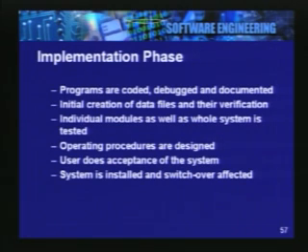Then we carry out the user acceptance, where the user will do a functional walkthrough for the system that we are ready to deliver to him. So functionally it should be acceptable to the user. Moreover, it should also be acceptable in terms of performance. Remember that in the SRS document, the performance criteria were also specified. So at this point, the SRS document will be used by the user to carry out the final acceptance of the system. Once the user has accepted the system, we are ready to switch over, the system can be installed. And once the system is installed, we are ready to use the software in day-to-day operations.